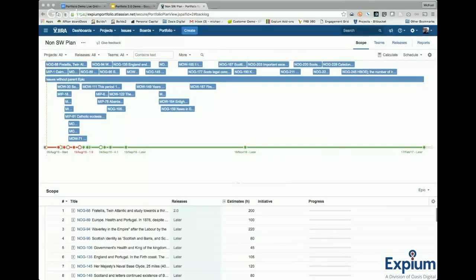Then I can make a second plan that shows adding 5 staff. And then I can make another plan that shows outsourcing to another organization. I can take different approaches to resolving that resource conflict and still show a baseline as a part of that analysis of what happens if we don't do anything. Does that answer your question?